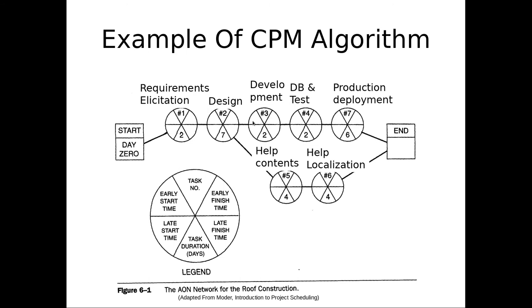Yeah, it's part of the critical path. That's going to delay this guy. This guy has got to start by what time to avoid delaying? 9. So if we delay this, it's going to start. So we need to take, ladies and gentlemen, of these two, 11 and 9, we need to take the what? Minimum or maximum? The minimum.